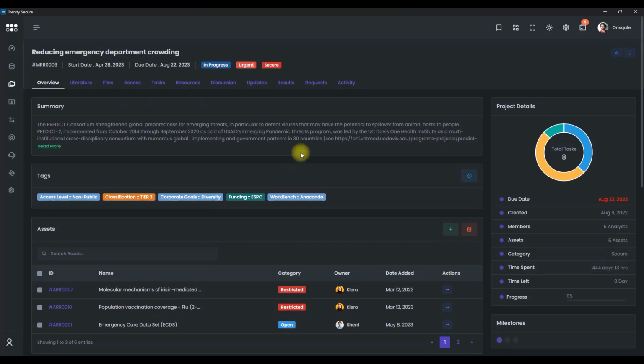So if you're starting a project, you want to break down your work into milestones, which will give the project managers or the admin an understanding of where you are with your project. So if you have 5 milestones, the system is going to calculate that as 20% each milestone. So if you complete 2 milestones, then your progress will likely be based on that milestone completion.